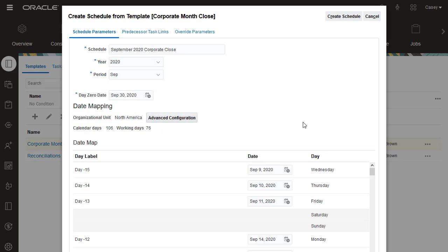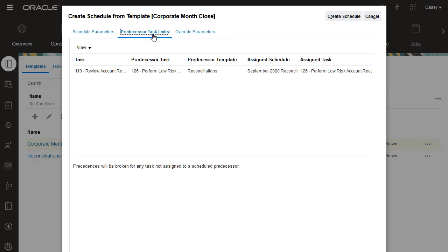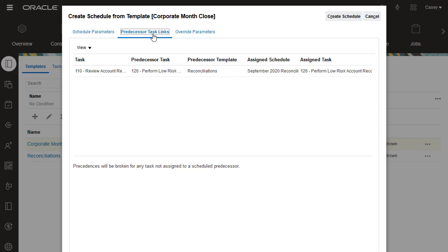A task in the current template might have a predecessor task in a schedule created from a different template. The Predecessor Task Links tab lists all tasks with predecessors in other schedules. For this schedule, the Review Account Reconciliations task has as its predecessor the Perform Low Risk Account Reconciliations task in the September 2020 reconciliation schedule. You can edit the predecessor links if needed.